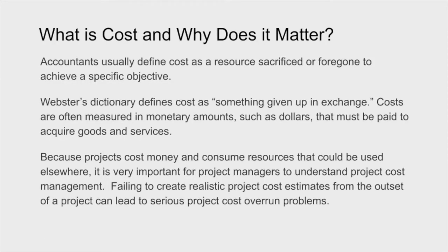Our experience in the world of projects has shown that costs can really get out of control really fast. And this can cause some real problems. I hold up Muskrat Falls as an example. The original cost was $6 billion. It came in over 12. So this is a real challenge for people who have to finance these projects. If you think that it's going to cost 6 and it ends up costing 12, that's a real problem, and it could seriously impact the viability of the company or the organization after the fact.